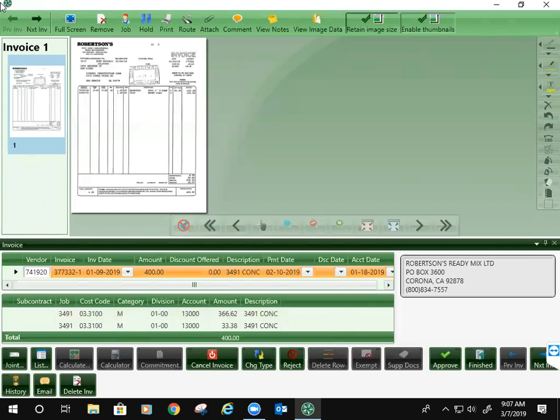All right. So the initial invoice, when it comes to you, accounting will code it, and they'll put in what subcontract it is, what job it is. They'll code the information in there. It'll be sent to you. If you agree with that distribution and that coding, then you can just accept and we can move forward. If you want to change the cost code or what have you, then you can drill down and we can change it. And we'll get into that too. Okay, sorry.